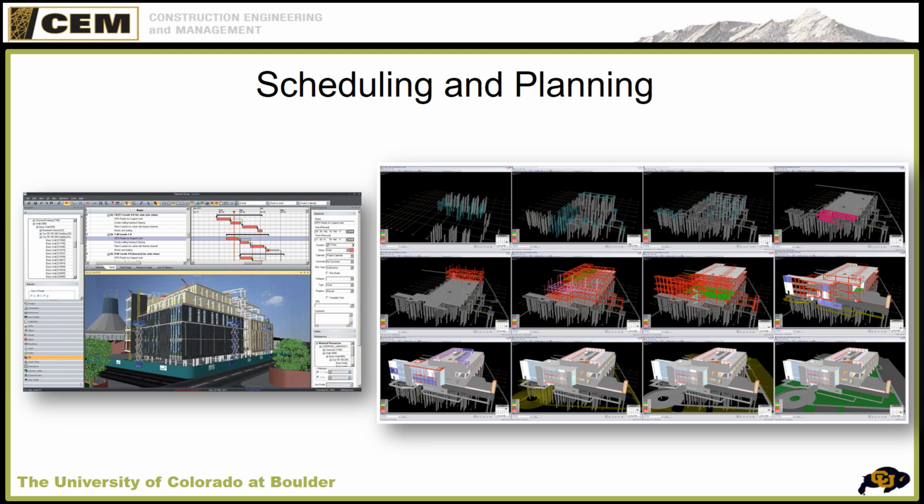A schedule also tells us, is this a feasible project? So oftentimes as a general contractor, we would commit to finishing within a year. Then we would go and build the schedule, and it got really scary that we weren't going to make it. And so then we figured out we had to work overtime or multiple shifts, and we would determine if the feasibility was what we thought it would be. And oftentimes, again, we commit and then we figure that out later, unfortunately.